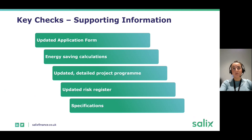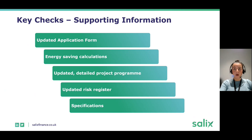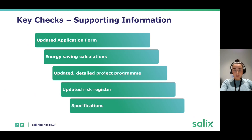Key checks we'll perform include reviewing the updated application form to ensure it's compliant with eligibility criteria. For example, if you're removing a site, you can no longer do energy efficiency measures there, as scheme criteria require a measure to decarbonise the heating at that site. We'll also check compliance with the £325 per tonne of carbon criteria; anything above that threshold must be funded by a client contribution.